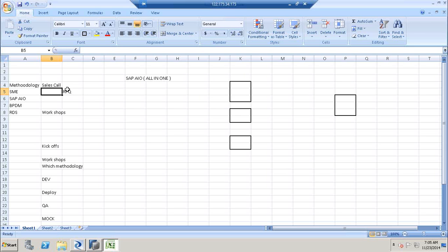The sales guy will tell you on an overview that this guy has some different sources and now he wants to merge them into a single source. Now in this RFQ, you will be writing: what are the different sources that you have? What is the volume of data? How many SAP systems? How many non-SAP systems? On average, how many tables will be there, right? With this, we will try to get a technical gist of the customer system to understand it better, right?